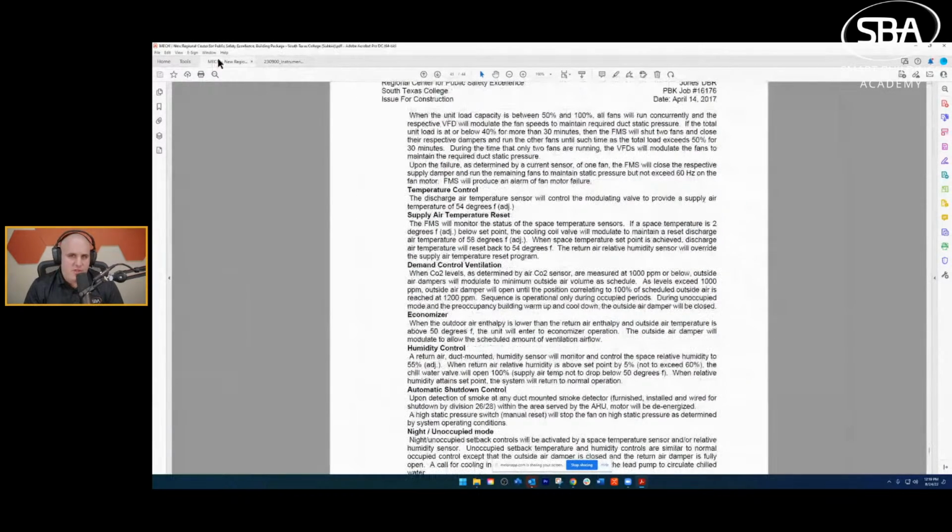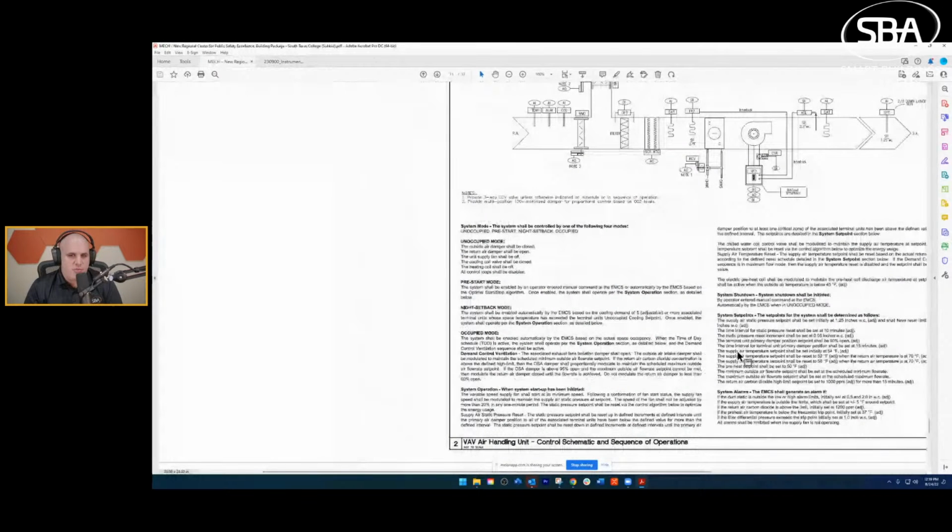And that would lead you to a request for information, request for clarification to go and figure out which one of these takes precedence. So these are all things that I look at when I look at a mechanical. I'll give you all a couple seconds to ask questions as I get ready to move into the specification.